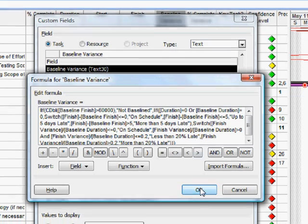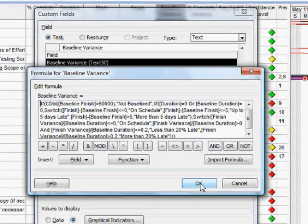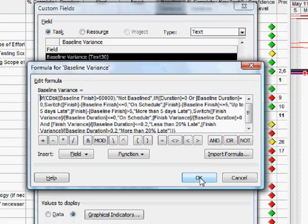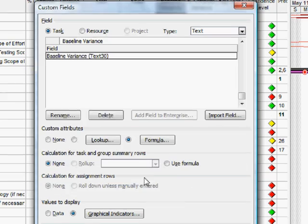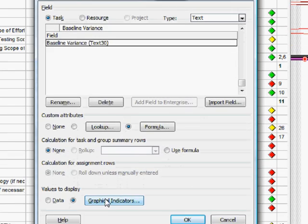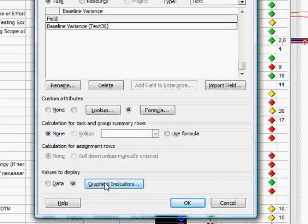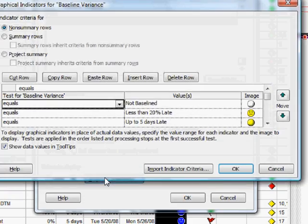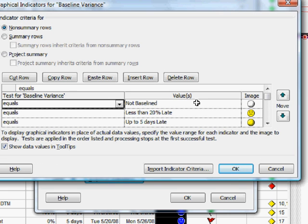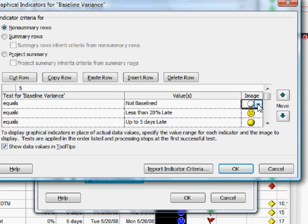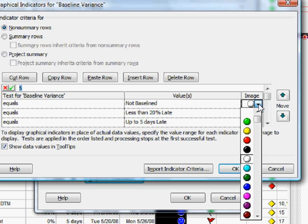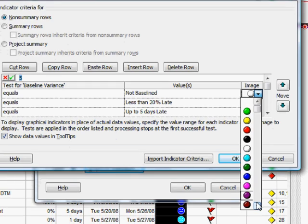All well and good, we get values returned from the formula. What do we do with them? What we do is we go down here to graphical indicators and we select indicators that we want to represent various conditions returned from the formula. When it returns not baselined I'm saying I would like a white ball indicator here and I choose that from the list of the indicators available to me.